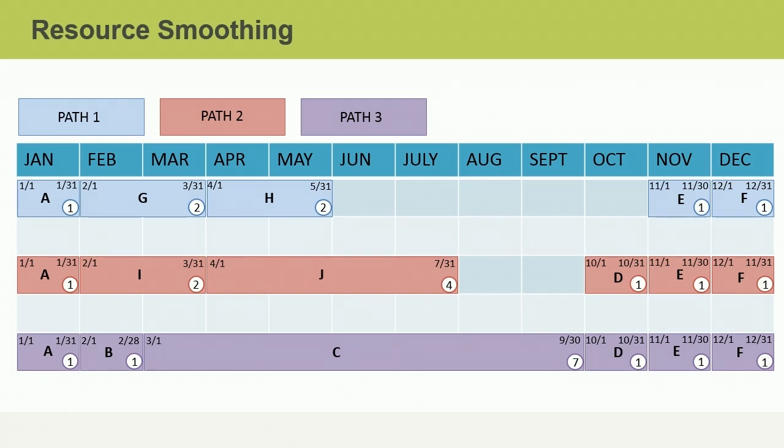Generally, there is some flexibility in your schedule, and you determine where it is by performing the forward and backward passes through your schedule. The free float in non-critical path activities is there to lend flexibility in order to meet the critical path deadlines. But sometimes we may encounter conflicts that are not along the critical path, where free float can still come in handy.